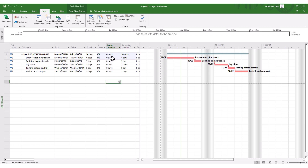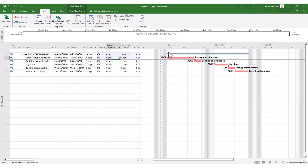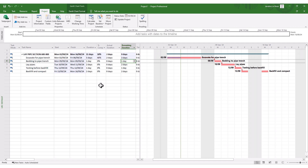To avoid this, my advice is to work in whole days. When doing an update, never focus on percentage complete — focus instead on actual duration to date and remaining duration. If two days have passed, enter actual duration as 2. Then if you're slightly behind and still going to finish on Friday, enter the remaining duration as 3 days. MS Project will automatically calculate and alter the percentage complete for you, so you never have to enter that value directly. You stay on whole days with no decimals.